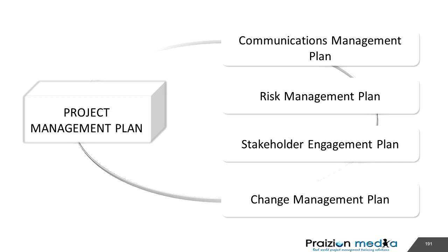Absolutely. So your stakeholder engagement plan and communications management plan are definitely both needed. Your communications management plan gives guidance on how to communicate. And of course, you're going to be doing a whole lot of communicating to engage stakeholders. The method, the format, the technologies for stakeholder communications are talked about here. And you could also have your risk management plan. Remember, stakeholders have risk appetites.